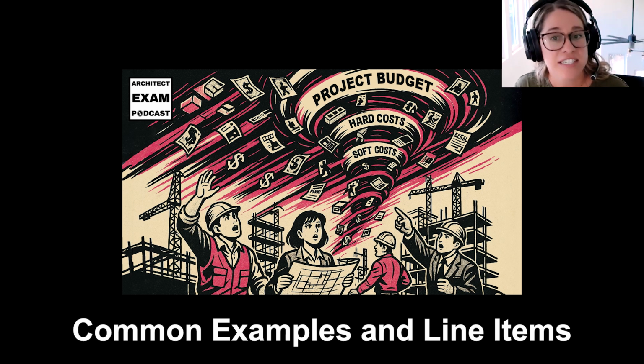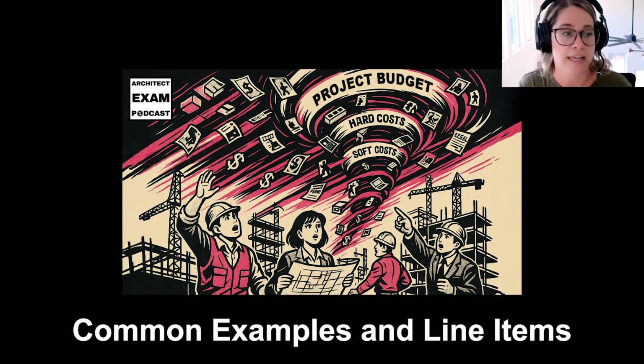Legal and accounting services are an often overlooked soft cost. This is part of the contract preparation and review process. Sometimes when your client is working on securing a property or land, the land acquisition paperwork that needs to happen is a soft cost. Tax planning, financial reporting, these kinds of paperwork, essential services that don't directly build the building but are needed are a soft cost. Financing costs can be enormous.